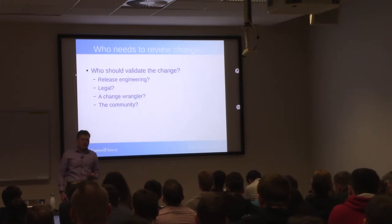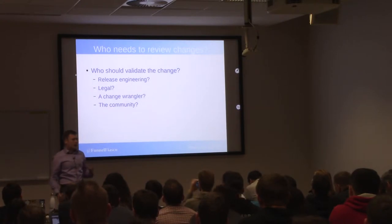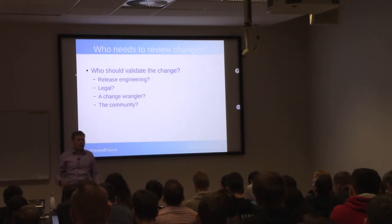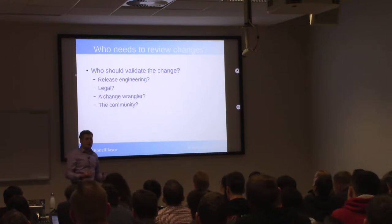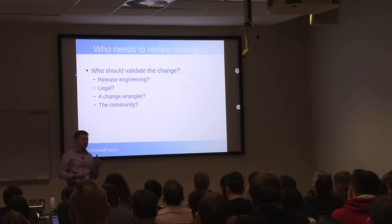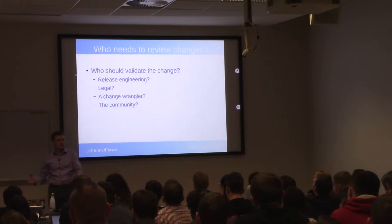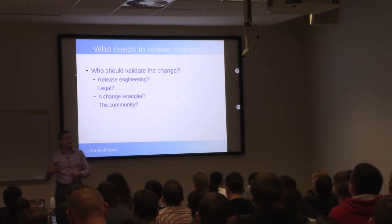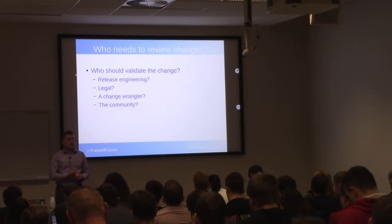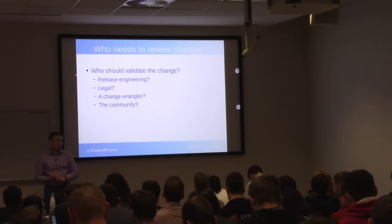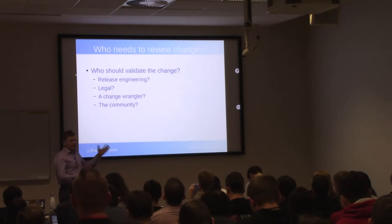One of the things we want to talk about is who needs to review changes — and this isn't necessarily the decision process. Think of it as a linting process: who gets a voice versus who gets a vote. Do you have a release engineering team who needs to say, "yes, this change will allow us to continue producing our release" or "this change is going to break our release process"? Are there legal implications — a new upstream package with a different license, changes to trademarks? You might need some sort of sign-off.